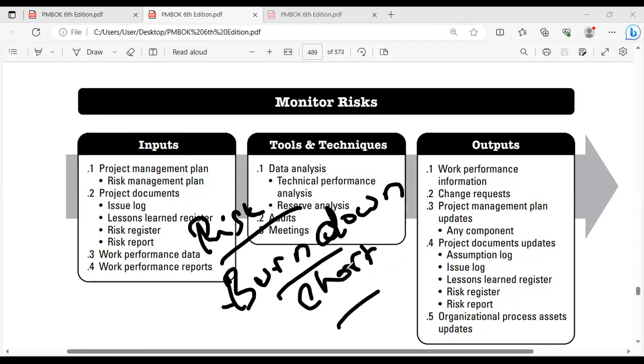So according to the Project Management Institute, for you to indicate whether you have sufficient resource in covering the remaining work, since the remaining work will be having remaining risk, you will either be surrendering all your reserves which you planned to spend for the risk events, or you need to have extra resource, then only you can complete your remaining work. So this will be indicated through a graphical display called burn down chart. That will be a risk related burn down chart.